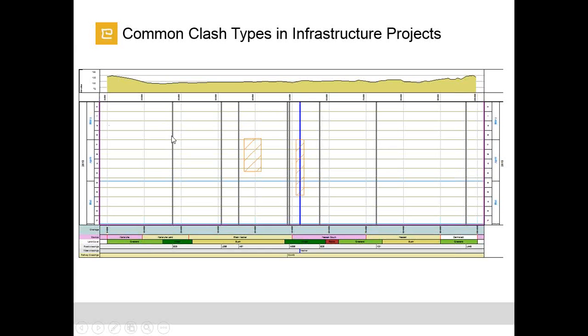So we need to plan this part of our projects better. And here, as you see, we have two hatched areas shown within rectangles. Let's say that they are our work limitations. This one in this scenario is representing another subcontractor. Let's say that on the river a bridge is going to be built, and another subcontractor is awarded this work, and we are not allowed to work in this area.